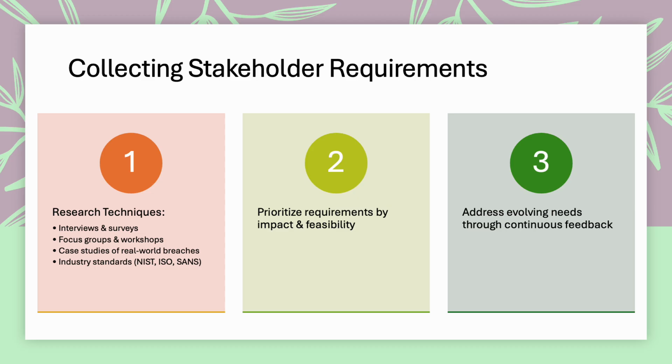Another challenge is the fact that requirements for a cybersecurity training program are not static. The threat landscape changes rapidly and new types of attacks emerge regularly. This means that requirements gathering must be treated as an iterative process rather than a one-time task. Agile methodology supports this by allowing scope and requirements to be refined over successive sprints. Feedback loops from pilot tests and ongoing phishing simulation provide real-world data that can shape future iterations of the program.